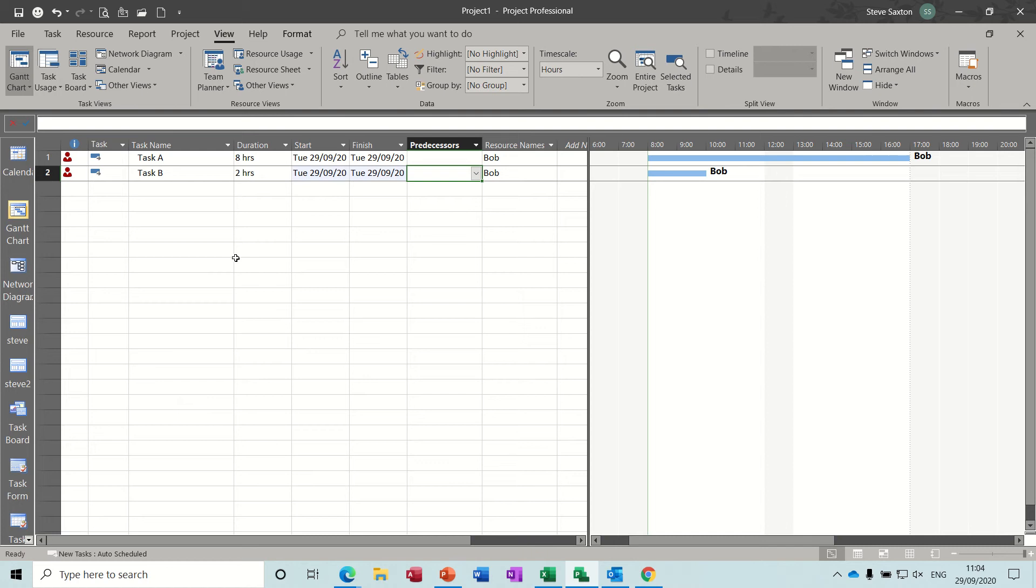So first of all, I've got two tasks, task A and task B, eight hours and two hours, and I've allocated Bob to each of these tasks. And you can see there straight away is over-allocated.